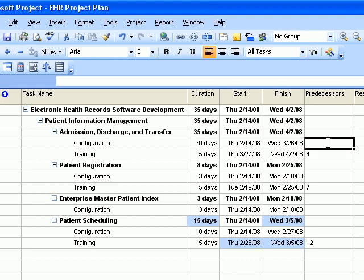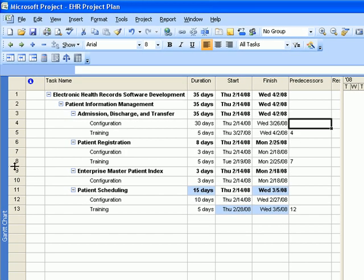Now let's continue entering predecessors for the main tasks. For Admission Discharge and Transfer, according to the rapid analysis exercise, the predecessor is Patient Registration. Since the last segment of that task to be performed is the training segment of Patient Registration, we'll enter task ID number 8.